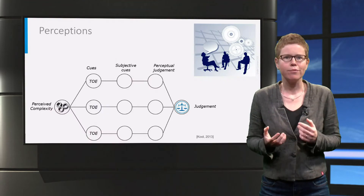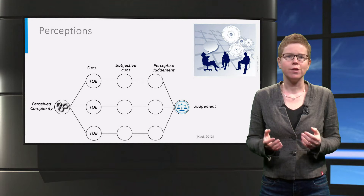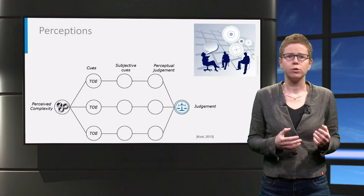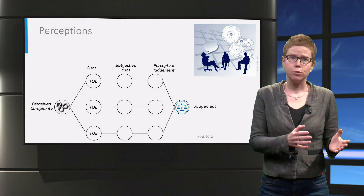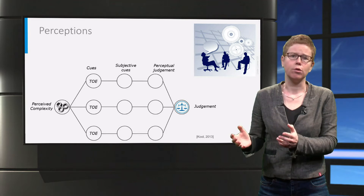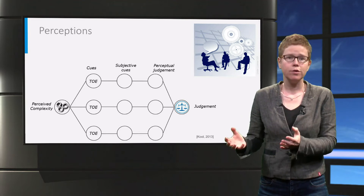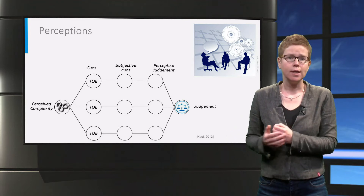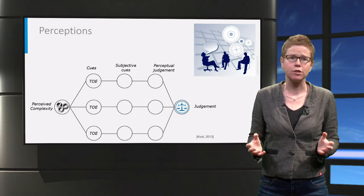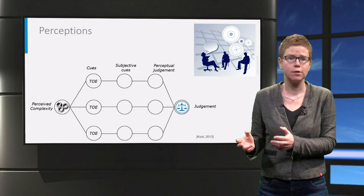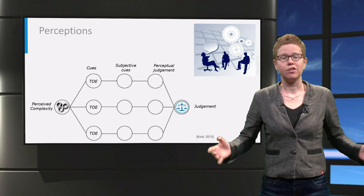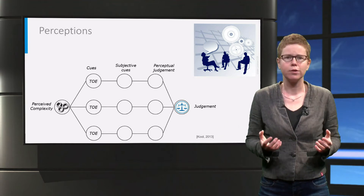Where does your perception come from? Without losing ourselves in psychology, we combine two models developed by Shearer, Stewart and Lusk, combining perceptual judgment and related cues. These cues can be seen as triggers, or in our case, elements of complexity. In the end, the perceived complexity of a project is created by the selection of certain elements of project complexity — these cues — followed by a judgment of these elements, and the sum of these forms perceived complexity.